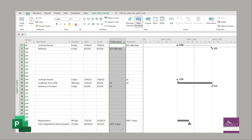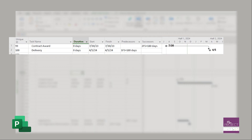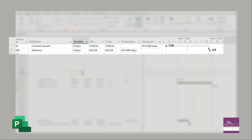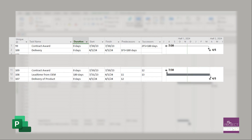This example shows how a lag is being used. We were told the contract is awarded and then here's when the delivery is — so 180 days is the lag. DCMA allows five percent of your tasks to have a lag, but I advocate that if you know what the task is making up that lag, put it in your schedule instead. In this case, put in that lead time. Yes, it's from the OEM — it's their lead time — but you can track the 180 days as an actual task.